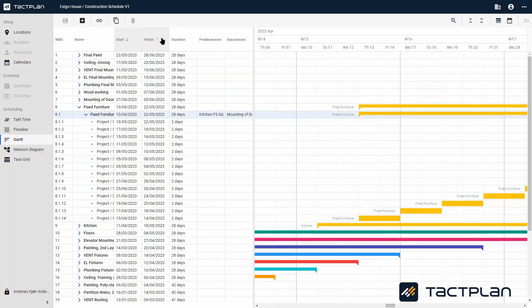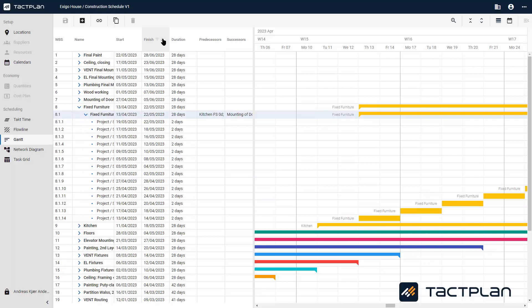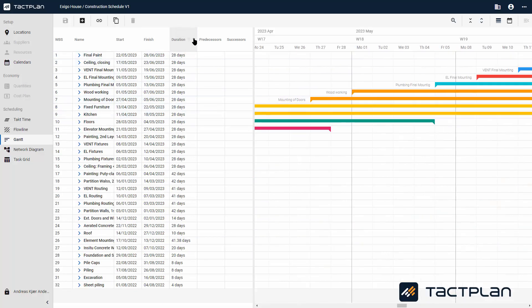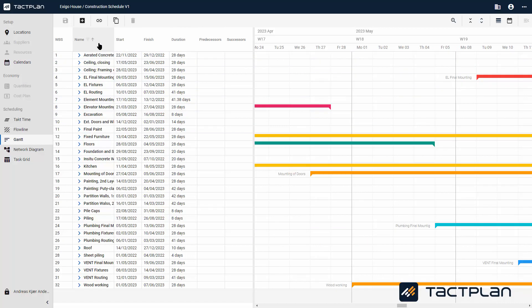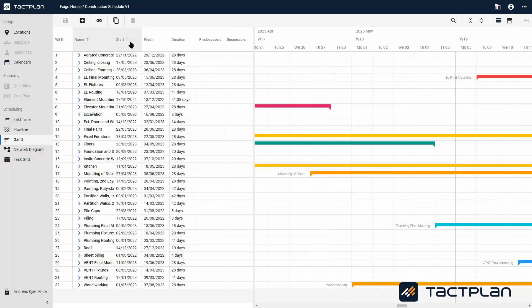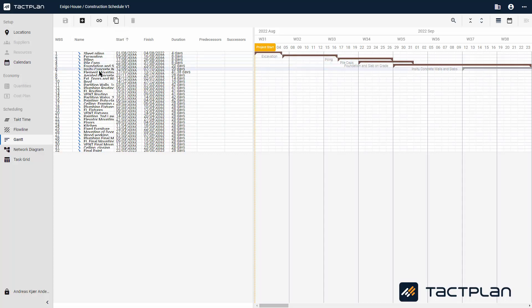It is also possible to sort by duration and by name. You can add a task, create dependencies, and duplicate a task directly from the Gantt view.